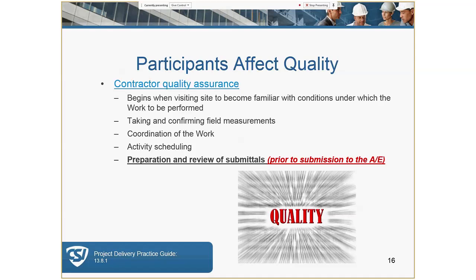The contractor is required to visit the site, be on the site, verify dimensions, supervise the work, anticipate problems before they might occur, and coordinate and schedule the work. So I want to underline or emphasize that the contractor is required to verify dimensions. For example, the GC cannot schedule the painter to show up the day after the block's been placed and expect the painting to begin on the block that's heavily laden with moisture and hadn't had an opportunity to cure. So that's an example of where the contractor is responsible for coordinating the work.